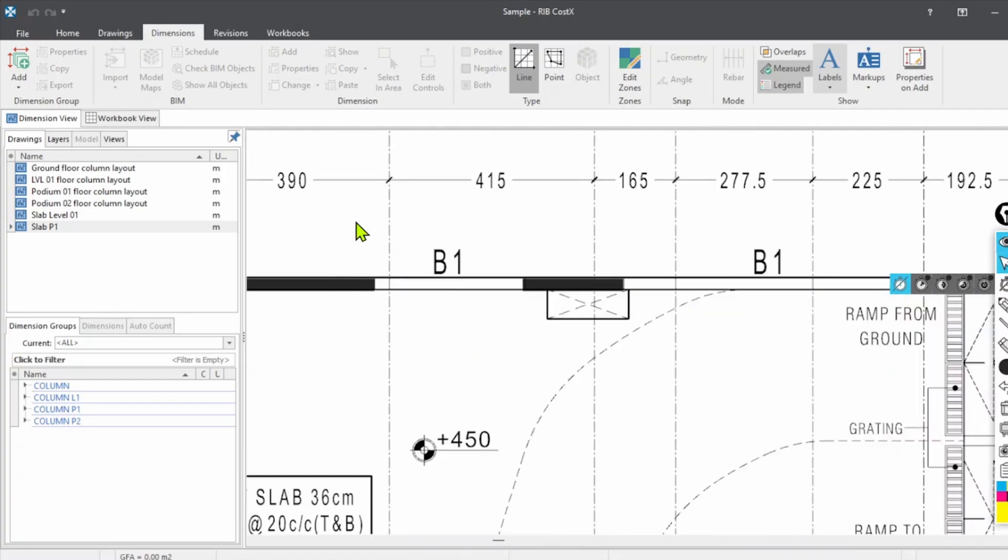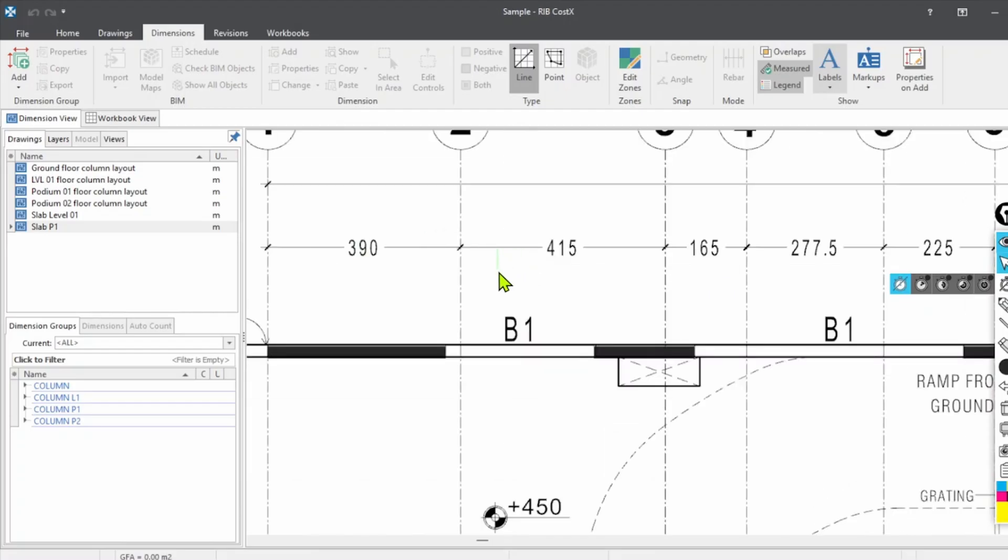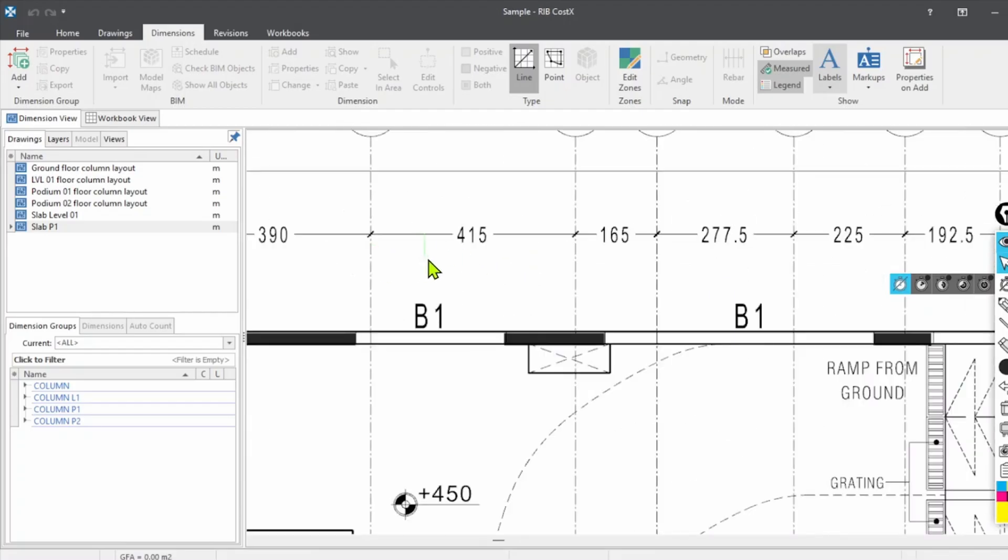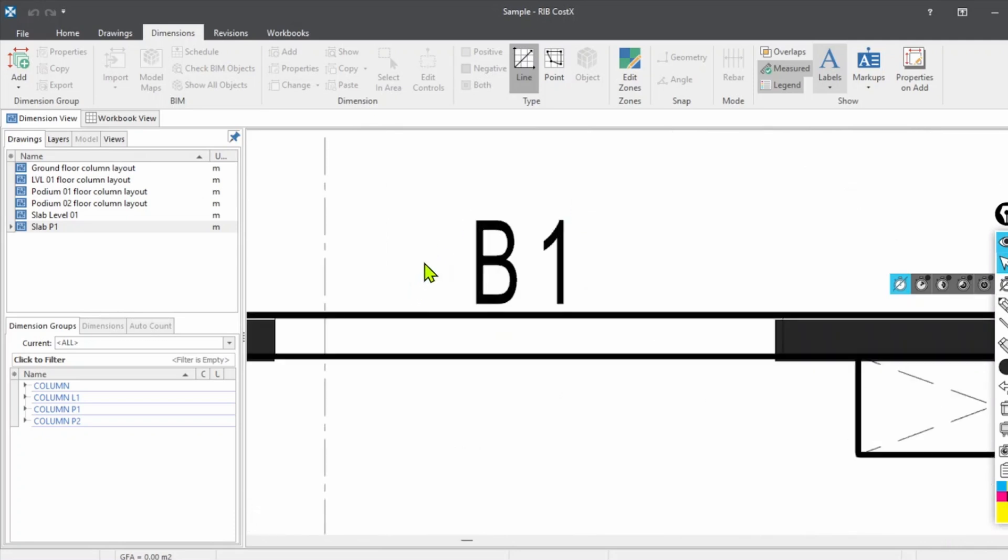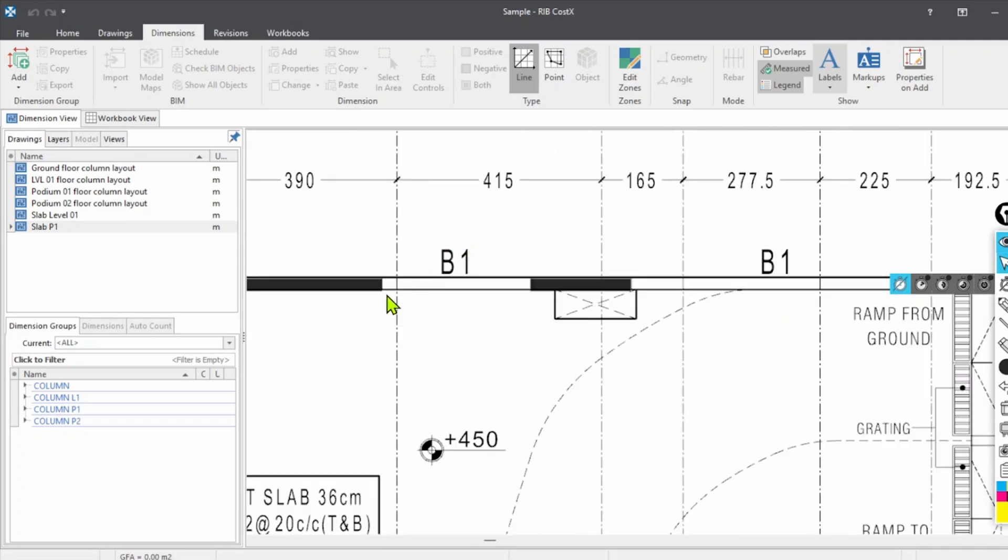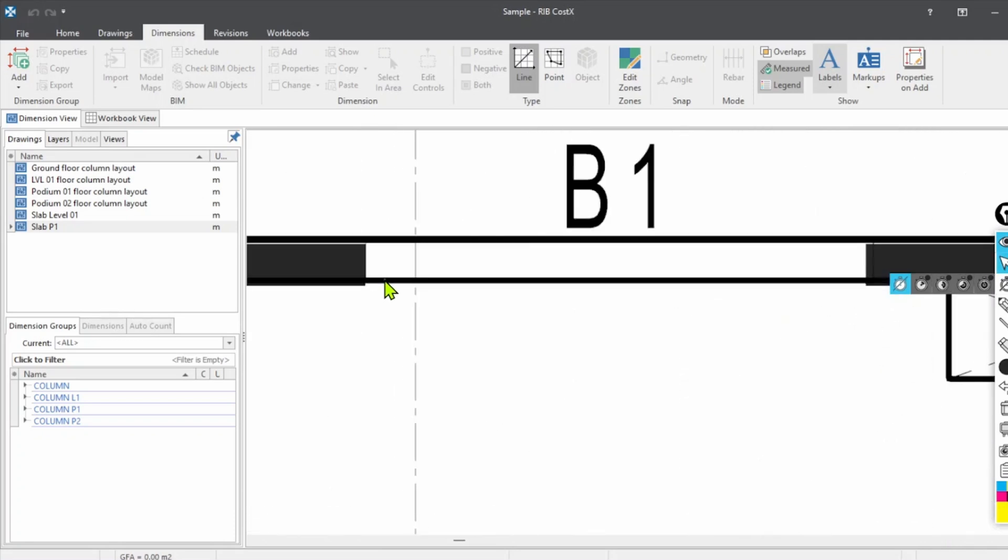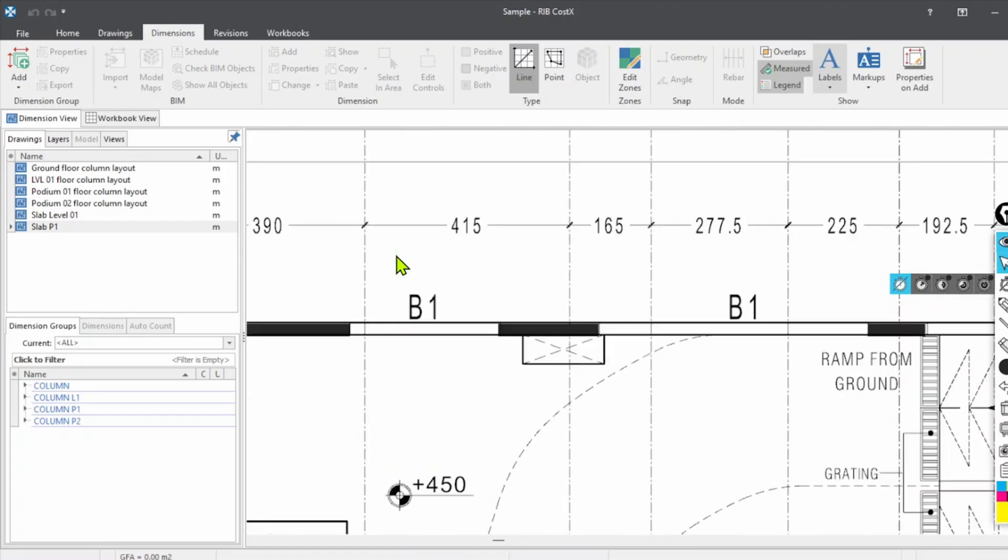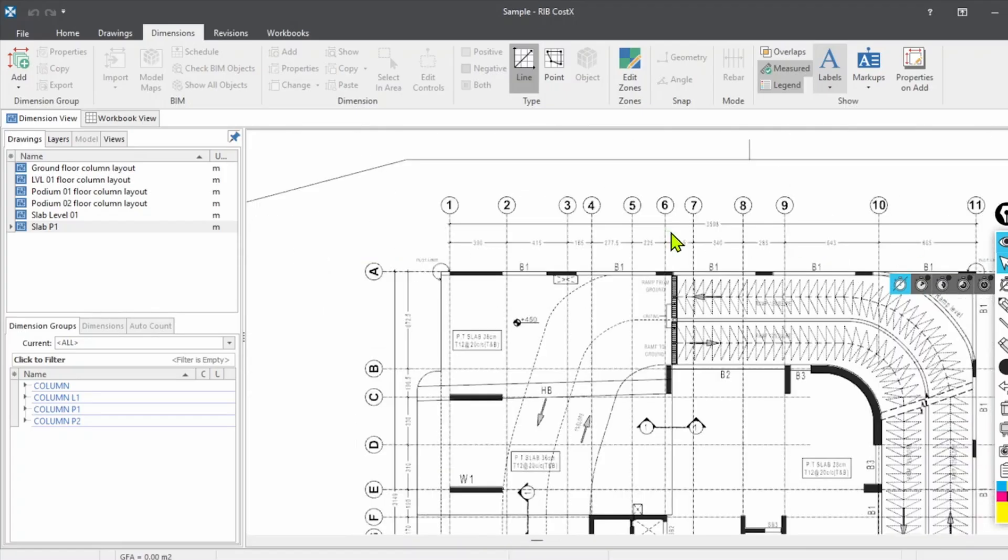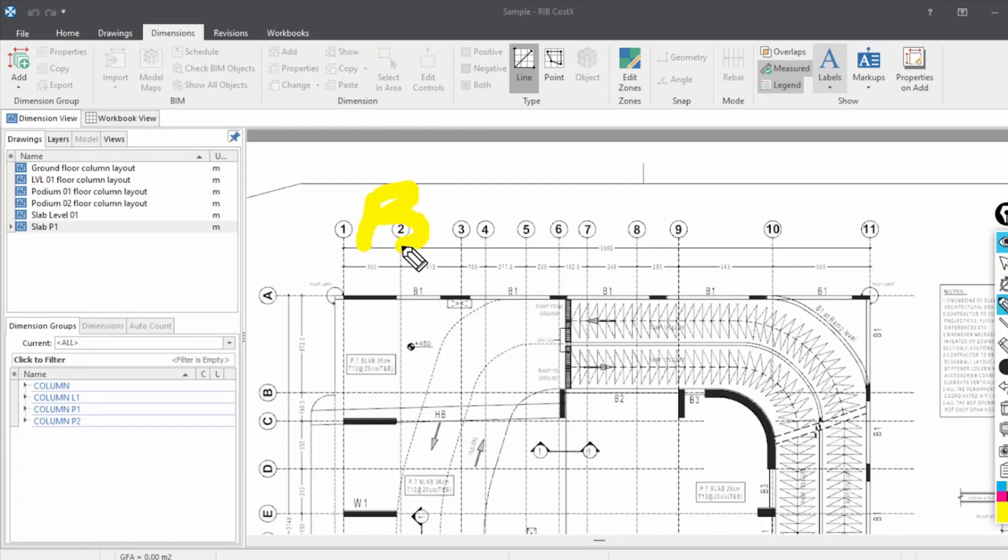Before starting the measurements, we have to know how to write the description for the markup. As we are doing some manual calculations, we're going to take the data from the descriptions and we are calculating shuttering and concrete as well. So we don't need to mark it again and again. For that, with a single markup we can take the data we need.